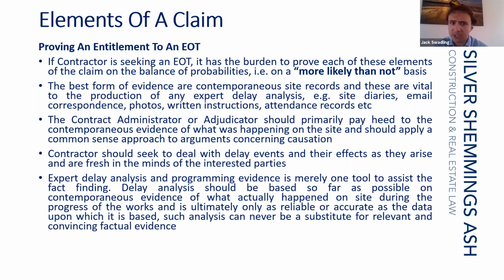all of these sorts of things are of vital importance. And on top of that, recently I've been advising clients, if they can, to put cameras on sites just to show how the work's progressing, because that sort of contemporaneous evidence can be really very useful to show what the pinch points in the project were. The contract administrator and adjudicator will primarily look at the contemporaneous evidence to establish what the cause of the delay was and what its effects are.